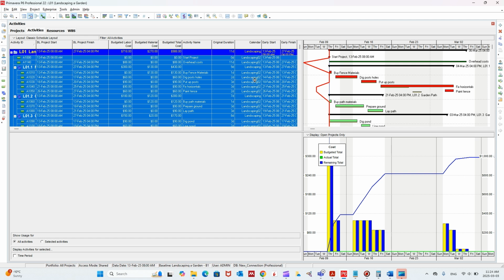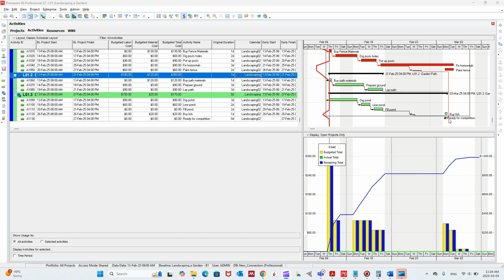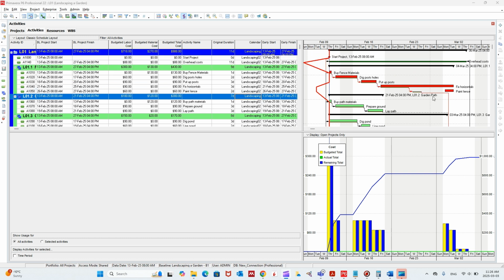What happened here is changing all the activities, so as you see here, the resources were moved from these days to the other day because the activity was extended through the holidays, as you see. But this is not the scheduled project. That's not scheduled because as you see there are contradictions here. So we need to reschedule.